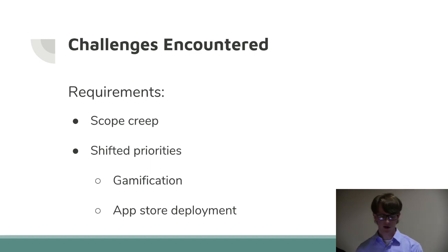And then finally, we had some challenges with the requirements. There was a little bit of scope creep because the sponsors came to us with a very flexible idea, and we were the first to develop code for it, so we had a lot of room to push back on things that they wanted done that we didn't think really fit well technically, or suggest other things that we think they should do.